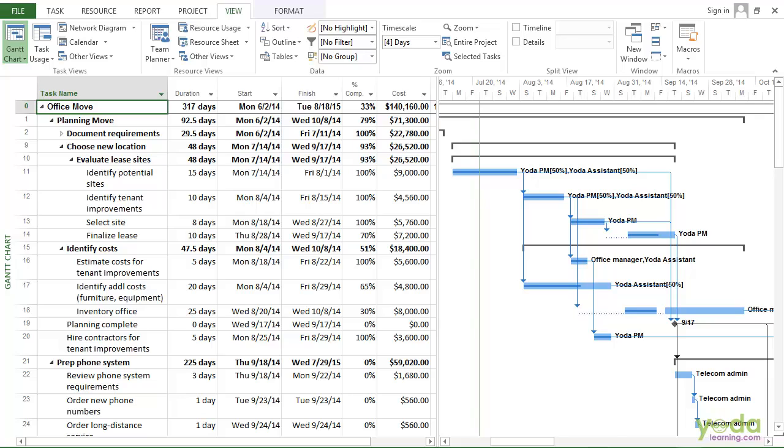After your project plan is approved, it's important to save the target values like dates, work hours and cost in the baseline. Project also keeps track of the actual values you record and the current forecast of the schedule. Before you evaluate performance in the project, it's important to understand what baseline, scheduled and actual values represent.